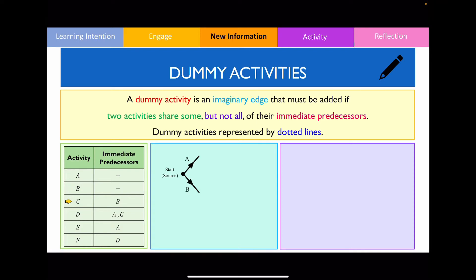In order to initiate activity C, I need to complete activity B in advance. So I'm going to draw a vertex to show that activity B has been completed and draw an edge moving away from it to show that I can now commence activity C. To move to the next stage, I need to complete activities A and C in order to move on to activity D. So I'm going to make them converge into a singular point and then draw activity D branching out from that vertex.